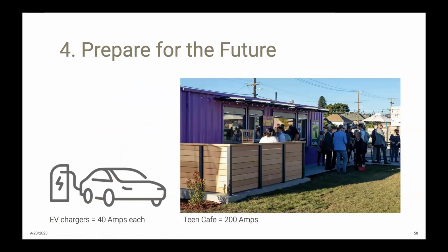So one other aspect of planning ahead is understanding as much as possible about the future electrical loads in the building and upsizing the electrical service accordingly, because for most organizations, a renovation project is the one chance to pursue an electrical service upgrade. The Boys and Girls Club renovation did include a service upgrade to accommodate the new HVAC systems, plus some wiggle room for loads in the future. But we didn't fully account for everything.